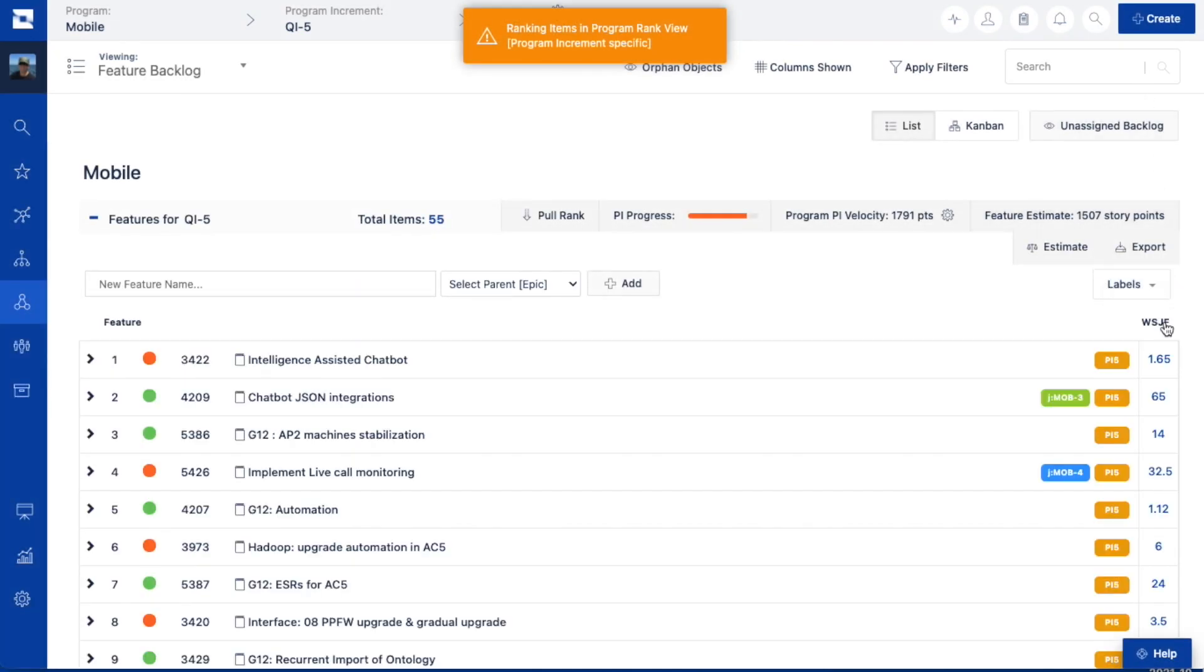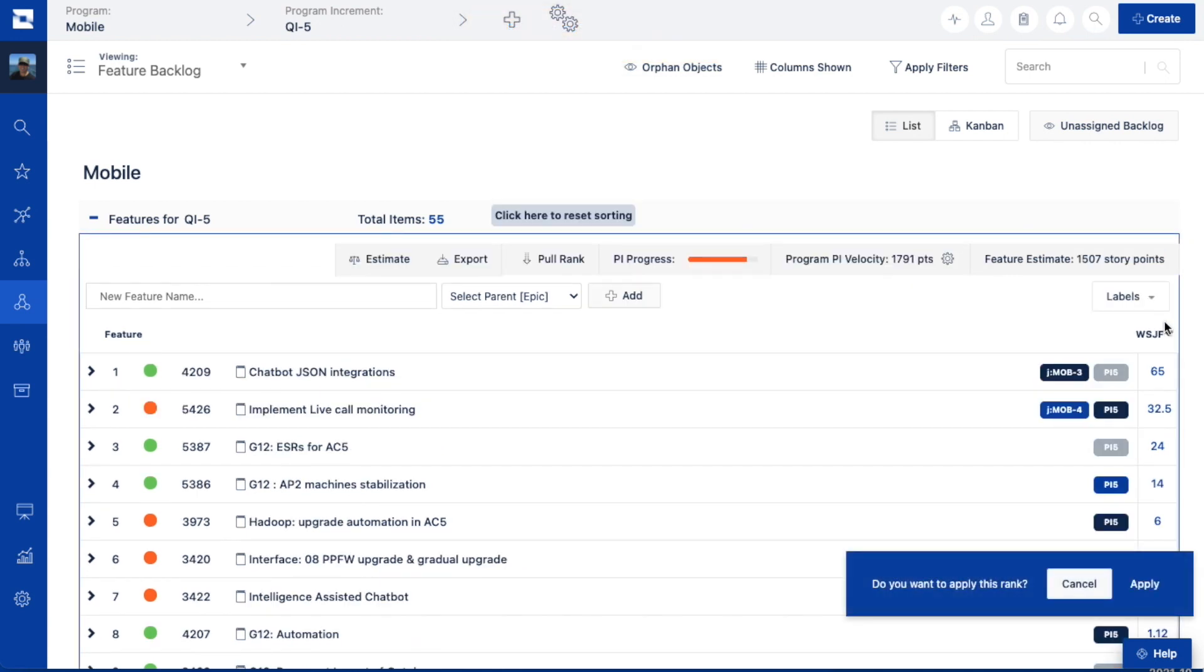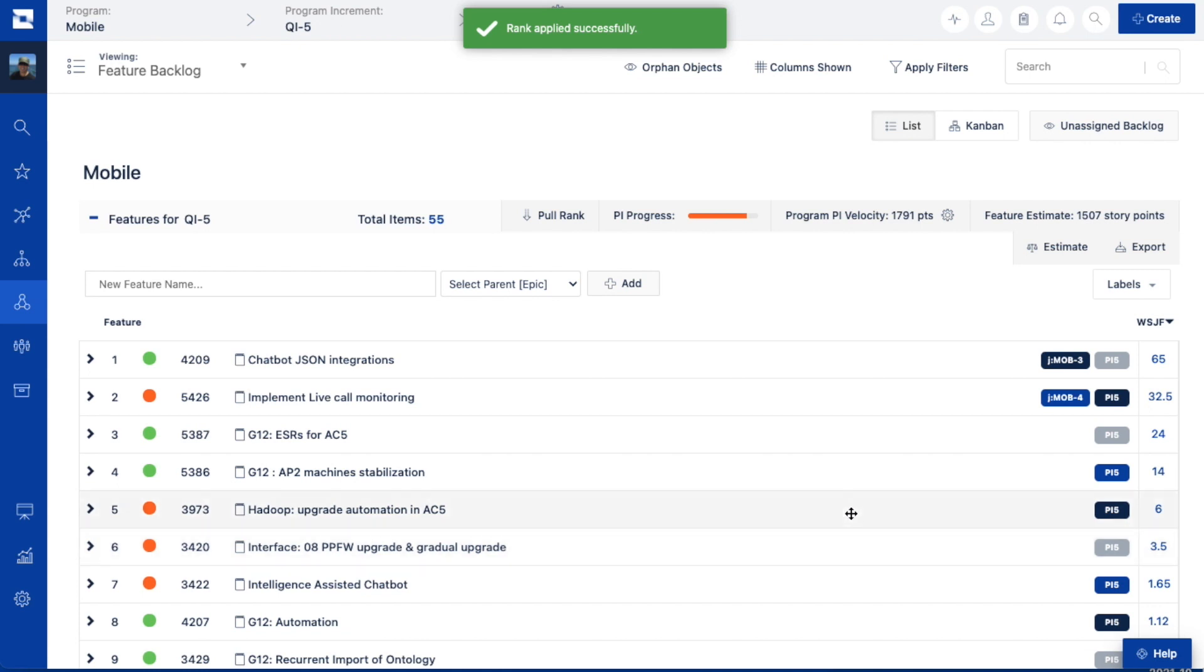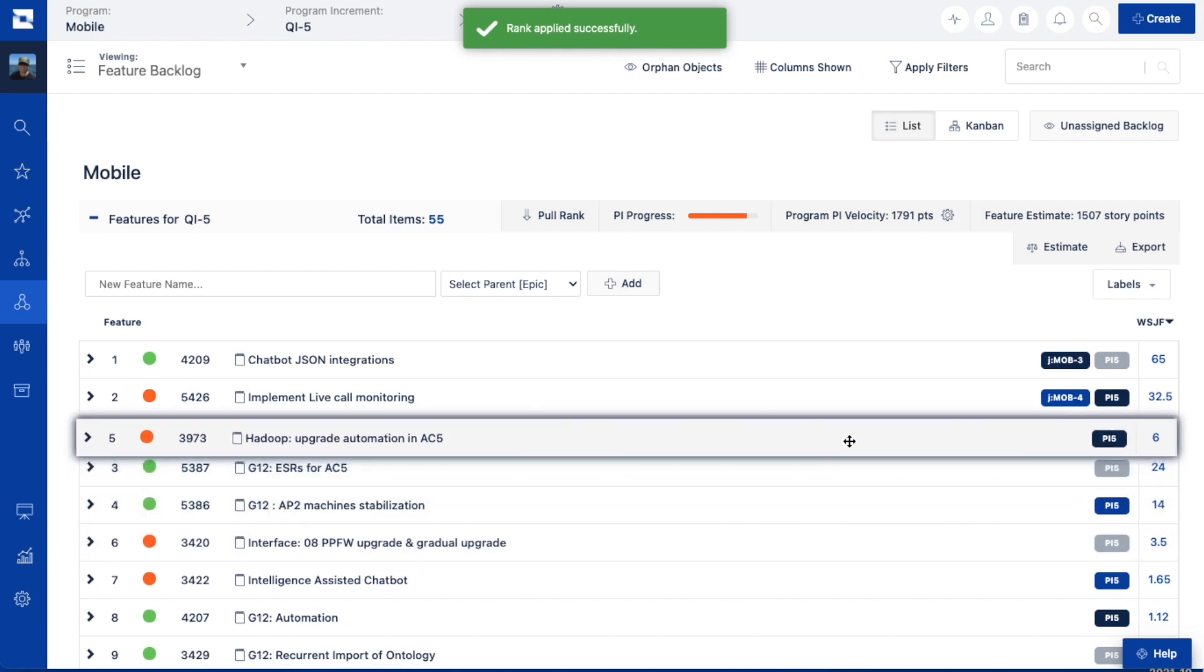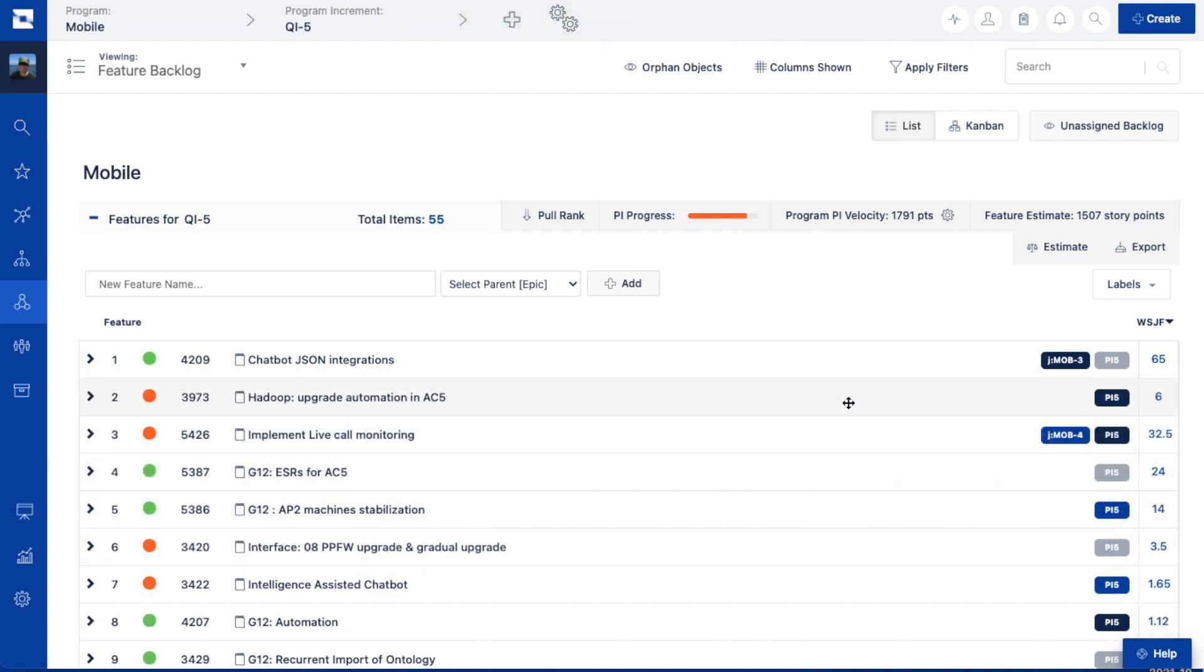The WSJF score can be displayed in the backlog for use during prioritization. When you click on the WSJF column header, you can preview a backlog priority ranking based on the WSJF score. From there, you can decide whether or not you want to apply it. You can also drag and drop work items to better refine your priority ranking.